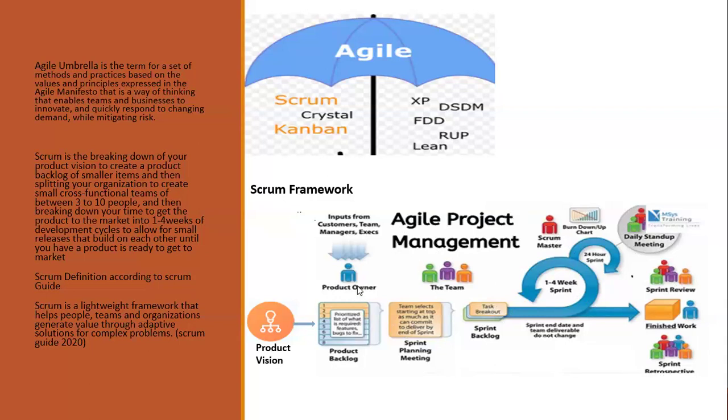After the product owner has broken down the requirements or information he got from the stakeholders into the product backlog, the next thing that happens is sprint planning, right? During sprint planning, two things majorly happen. One, the product owner will decide what the team is going to build. The development team will then draft a plan on how what the product owner has proposed is going to be built. They will do a task breakdown from what the product owner has told them, and break it down into what they call the sprint backlog.